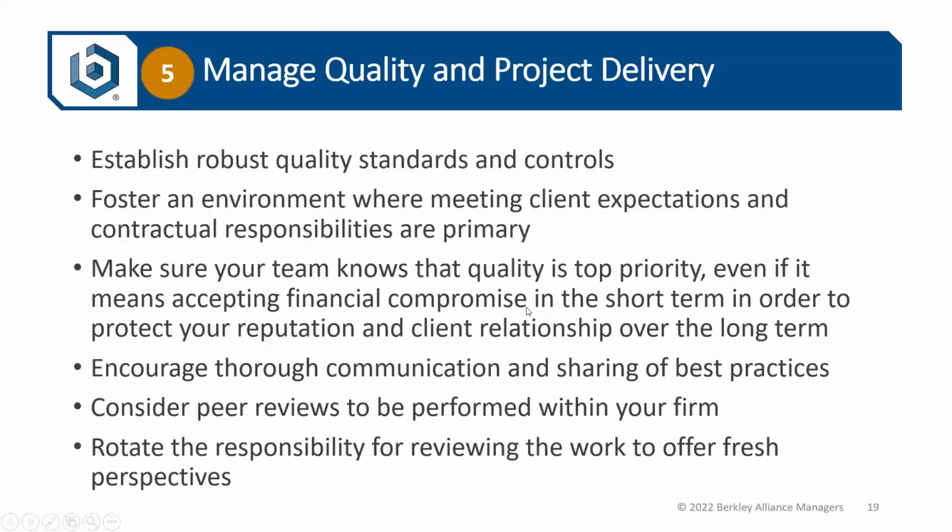So thorough communication and sharing of best practices within your firm is very helpful. You learn from every project. Let's not just bury those lessons learned into the project experience that you have, but have a situation within your company where you've got maybe some post-occupancy or post-project completion discussions amongst the project team and certain other members of your construction firm. We say the same thing for design firms. You're going to learn on every project.